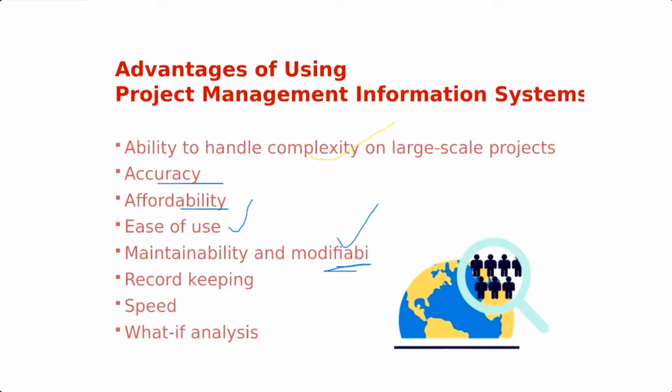So, for instance, in the construction industry, they use specific pieces of software that do everything for them. It manages the project, but it also does estimation for them. So they literally type in a 4x5 square wall, and it turns out a cost estimate in terms of how many bricks they're going to use, how much cement, how much sand, how much stone, how many hours, and so forth. So there are certain industries where you buy bespoke packages that are specifically modified for that particular industry.